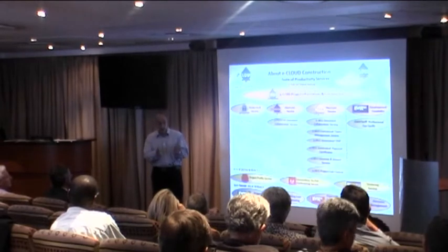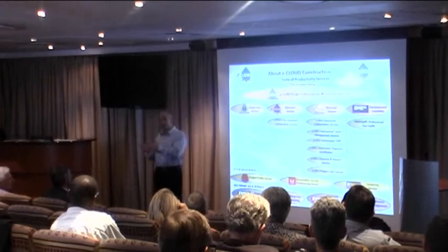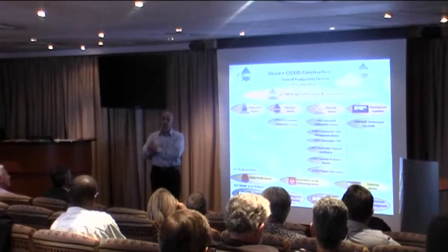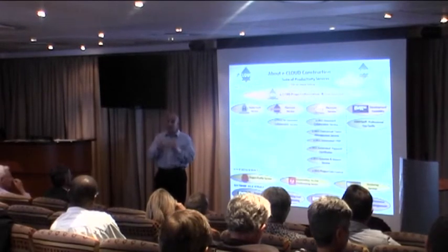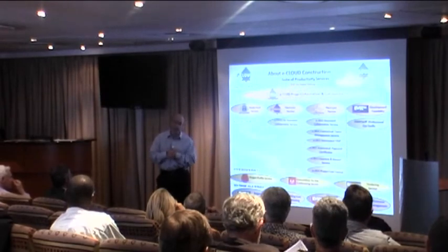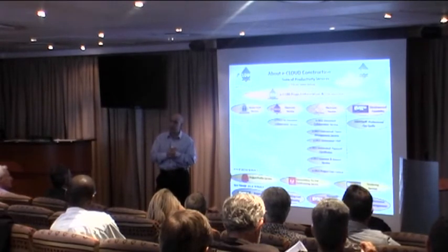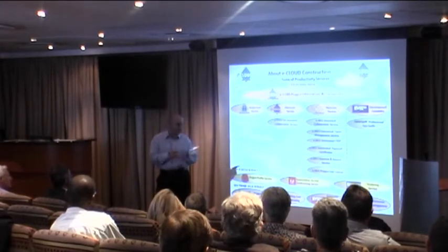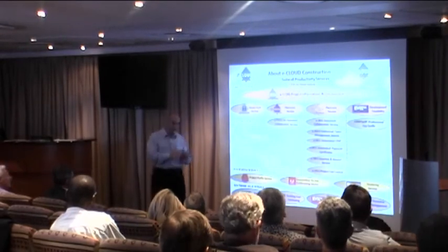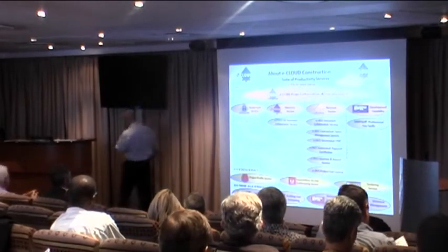So you allocate activities, so many hours spent on estimating, so many hours on bills of quantity, so many hours in meetings, and it rolls up into a total cost per month per employee versus the actual and budgeted fees coming through on a project. That's been in existence for many years, and as I say, MLC uses that. They manage all their incoming fees across their different branches. So that is a timesheet system. I'm not going to have time to go into the detail, but I think you get a feel of what they're offering. Prices, I think, quickly before that.